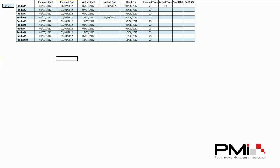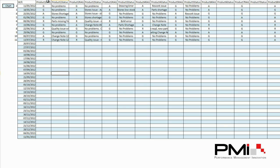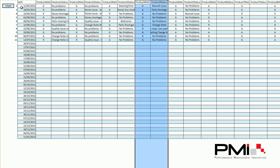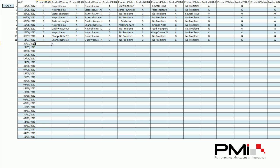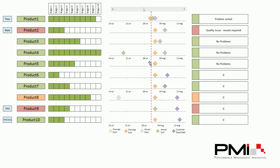The RAG status data sheet has your different products along the top — product 1 RAG status, product 1 status where you type something in, then product 2, product 3, product 4, etc. As time progresses, the weeks go down. So if you enter week ending 20th of July, you simply select the RAG status you feel is appropriate for that particular product and type something in. Currently it's showing red for product 1 with the change note issue. If I go in and change that to green and put 'problems sorted', then going back to the chart we can see the RAG has changed from red to green with 'problems sorted'.